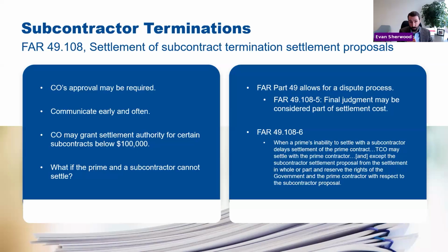If you have a deadline to submit your termination settlement proposal, you've got to meet it regardless of whether you have been able to reach termination settlements with your subcontractors.